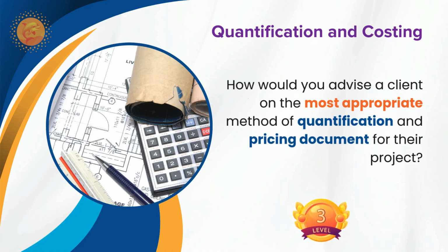For advising the most appropriate quantification method and pricing document, first I will check the requirement of the client. Then I will check the design responsibility, then the complexity of the project, the risk attitude of the client for this project, then the timeline requirement for the construction. These 4 or 5 points I will check.